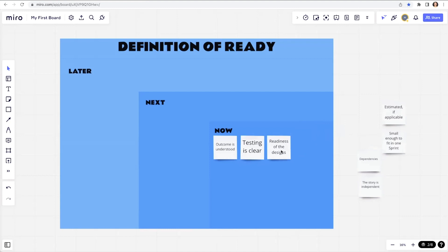Let them negotiate and get to a point of mutual understanding. That level can change over time. We might start with wanting 80% of the designs to be done because we really don't understand a new feature, or we can be at the level where with some wireframes and an idea of what you want, we can already start developing. It depends on the team. Let the developers and designers define the readiness level for them to be able to start working.